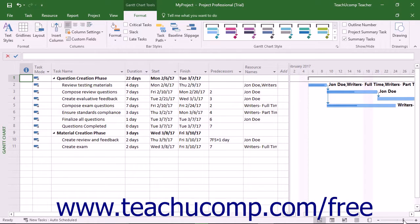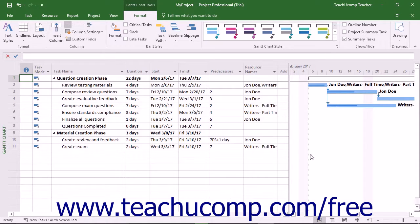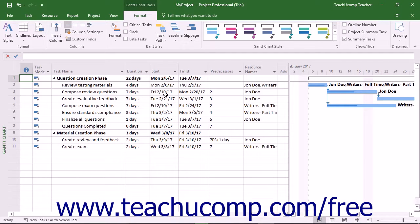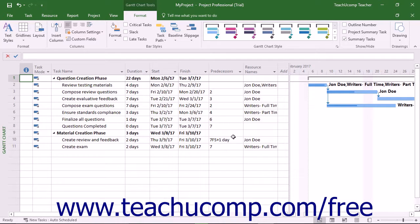For many views, such as the default Gantt chart view, note that this changes the timescale aspect shown in the view, but does not change the magnification of the task list shown in the view. It does magnify all aspects of graph views when it is used.